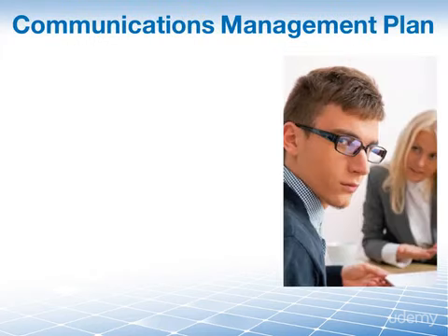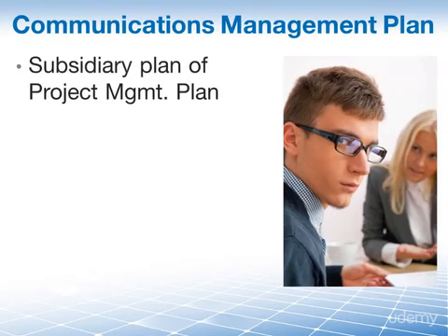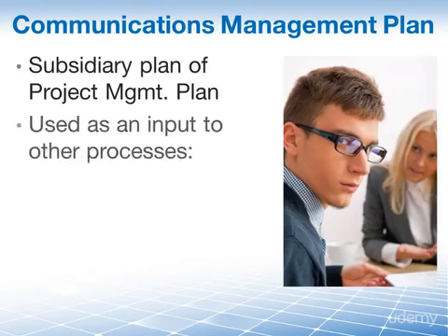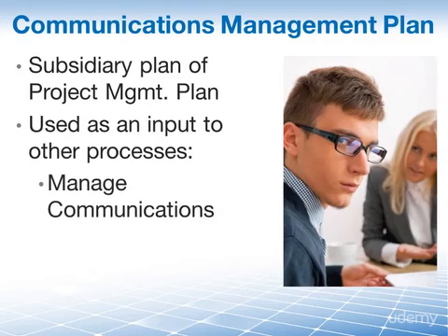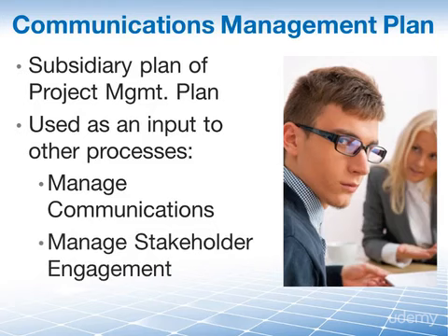The Communications Management Plan is an important subsidiary plan of the Project Management Plan. It will be used as an input to two other processes, namely manage communications. That's the process that follows right after this one here. But we also hand it off to another knowledge area, to stakeholder management. We use this as well in manage stakeholder engagement. The communications management plan is constantly revisited throughout the project and updated when appropriate. That way it remains current and accurate as a living document should.